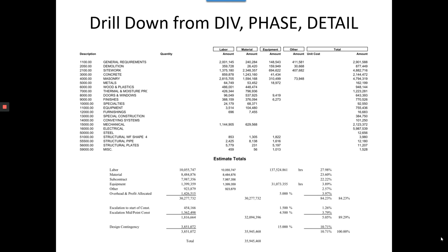And what you end up getting from CTN is a drill down kind of estimating. So we'll do the project by, let's say, by division, or we'll do it by work breakdown structure, and then we can take the total amount, we could drill down into that total amount to see what makes up that amount, all the way down to individual item records, crews, productivity.